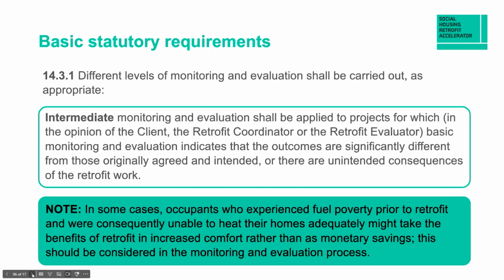So the next monitoring regime, called the intermediate, should be applied for projects which require significantly different approaches or have more difficult approaches to how they're retrofitted, or where things aren't working as anticipated. So if we put in, let's say, an air source heat pump, and the resident isn't feeling the benefit of the heat pump, it might be worth coming down, getting the heat pump engineer out to have a look to make sure it's been commissioned correctly, that the resident knows how to use it, that they understand that it is a lower heat temperature than their perhaps gas or oil-based boiler, and running through those.